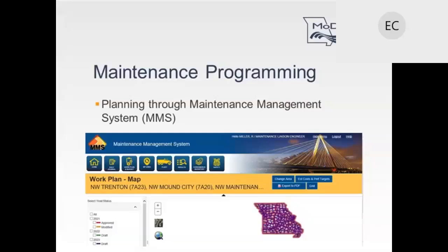All right, so the 3% is the tolerance that we want the program to grow. You know, we don't want it to grow more than 3%. Districts program their list of projects as a total, we look to see where they are in relation to the movement of those jobs. So if your project's moving through the STIP, and you're going to build it in year 3, we don't want to see that project estimate grow more than 3% as you update it from what you initially programmed. Did I say that right, Monica?